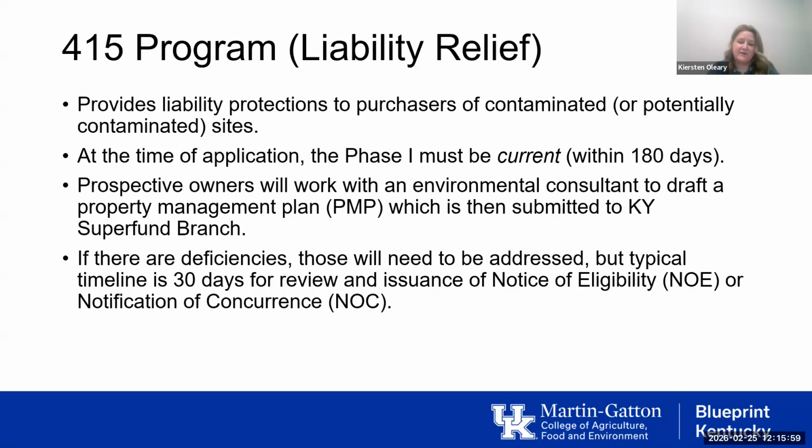And so at the time of your application for the 415 program, which we're going to have a whole webinar about next month, I'm sure Tyler will tease the date toward the end of the webinar, just so you know, the phase one has to be current at the time of the application. So it may be best practice, when you get that assessment report, if you're interested in enrolling in that program, to start working with your consultant to develop that property management plan, so that you don't have to go back and repeat the phase one.